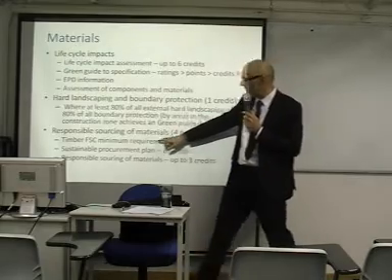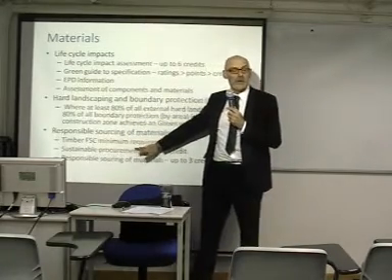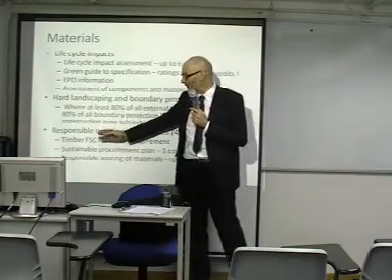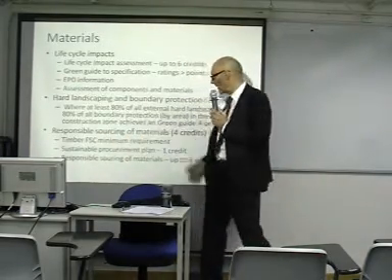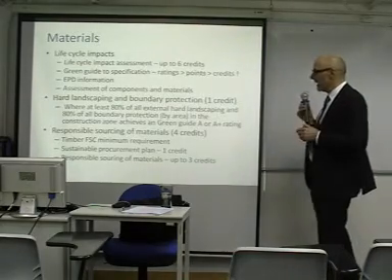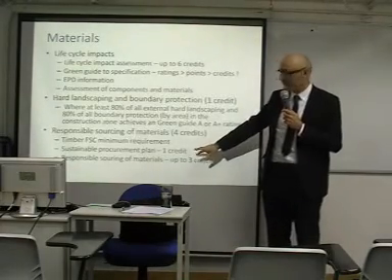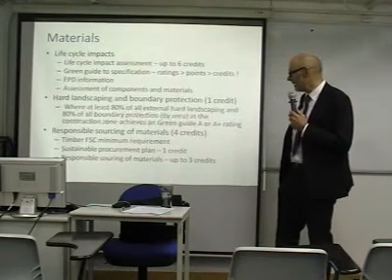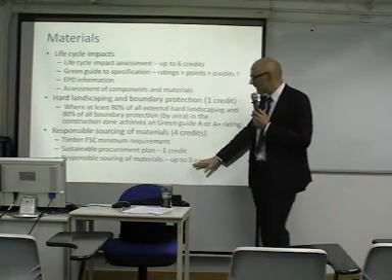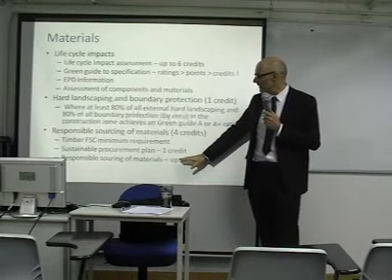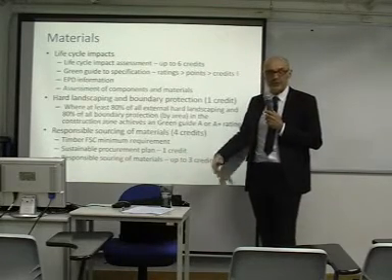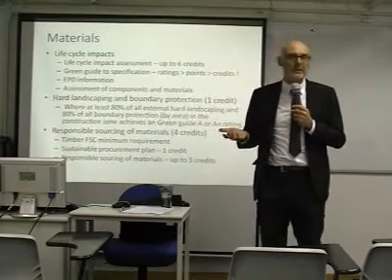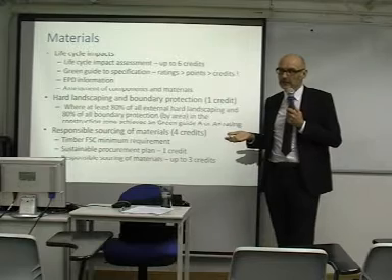Responsible sourcing of materials. Basically all timber that we now use is FSC accredited, so it meets the Forest Stewardship Council's guidance on access. Also, you can have a sustainable procurement plan for your materials, which also, just by writing the plan out, gives you a credit. So that's another aspect to focus in on. As well as local. Responsible sourcing is obtaining your materials from local sources to minimise transportation, reputable producers, people that don't put waste into their environment.